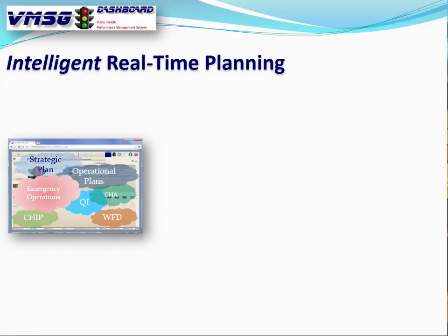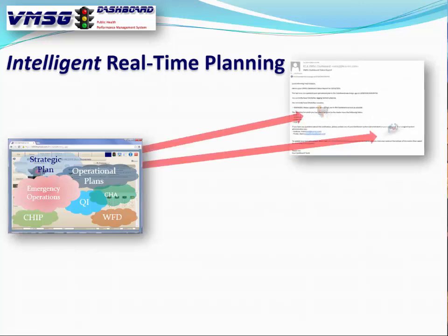On a scheduled day or days, the system looks at each of your users who've been assigned as team leads and asks 3 questions. Have you been in the system in the last 30 days and updated your stuff? Do you have any activities behind schedule? Do you have anything overdue? If selected, any of these 3 will trigger an email to be sent.